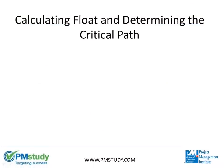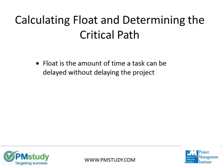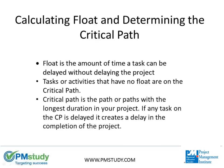Now that we have finished the forward and the backward pass, let's determine float for each task and locate the critical path. Remember, float is the amount of time a task can be delayed without delaying the critical path. Also, tasks or activities that have no float are on the critical path. The critical path is the path or paths with the longest duration in your project. If any task on the critical path is delayed, it will delay the completion date of the project.